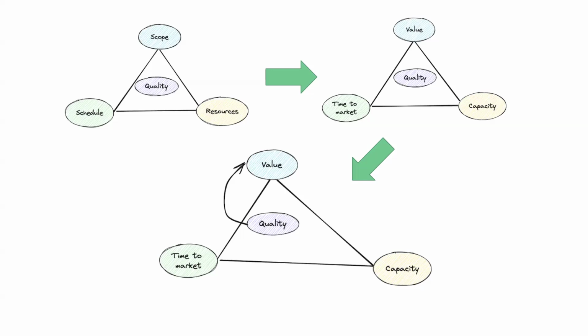And then, unless they're extraordinary individuals with some existing expertise and things, it's probably going to be another 3 to 6 months before they are truly productive. So you're really talking about a 12-month window from the time at which you say, yeah, let's get more capacity, to when you really have more capacity. And so I think that whenever those conversations happen, it's really important to remind everyone that that's what we're talking about.